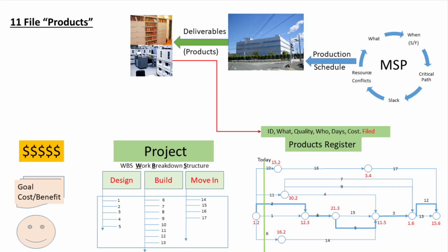Second, the approved product is filed somewhere or other, either electronic or filing cabinet or warehouse or anywhere, and that location is logged in the product's register, so that anybody who wants to have a look at the product can look at it, find information, check it, and so on. All very simple.